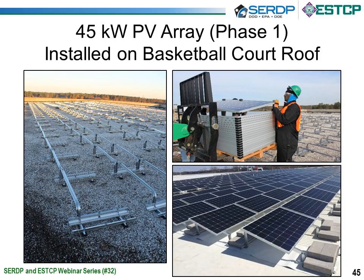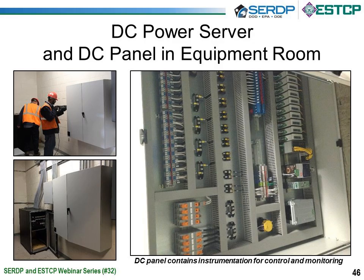The rooftop solar installation is exactly the same as it would be for an AC system because solar panels produce DC. Typically, all the wiring on the roof is already DC, and at the ground level is where it would typically come into an inverter and become AC. So we can contract regular solar installers to install the PV array, and we simply say leave off the inverter and we will connect that up to our DC microgrid. And inside the building when we're hanging the lights, we can contract regular electricians because the lights are hung the same way a replacement light would be on an AC side.